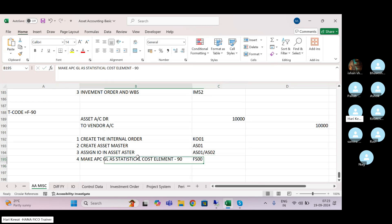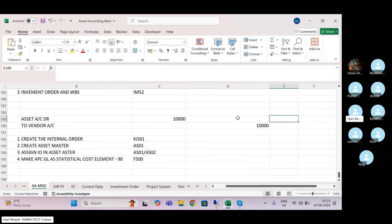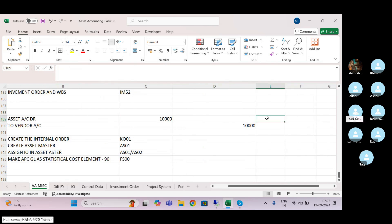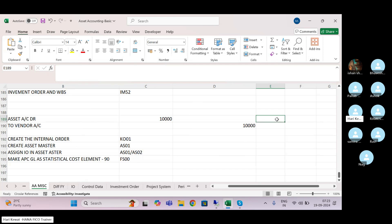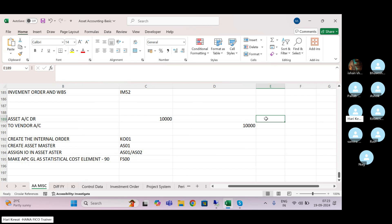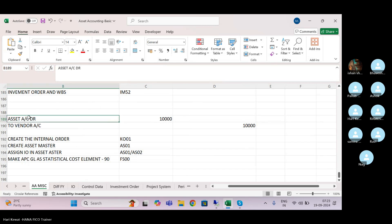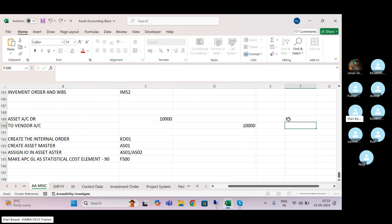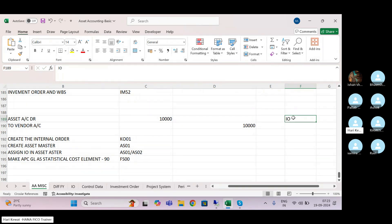You might have never heard what a statistical cost element is. Statistical cost element category is 90. If you don't make the asset GL a statistical cost element, then the internal order will not derive in that line item when you purchase the asset. If the internal order is not deriving in the line item, then the budget will not work. For the budget to work, the internal order on which the budget is loaded must appear in that particular line item — then only SAP will understand which internal order's budget to check.